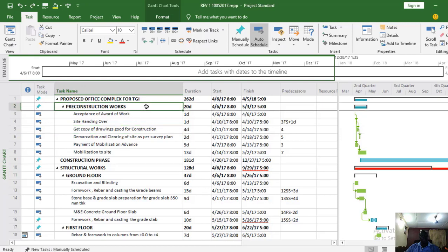Let me also note here that for most of the assignments I gave, I said we should just do superstructure and substructure. Please, I do not want to confuse us. I expressly said this is just for the purpose of the assignment. A good program of work must be broken down into smaller, manageable activities.